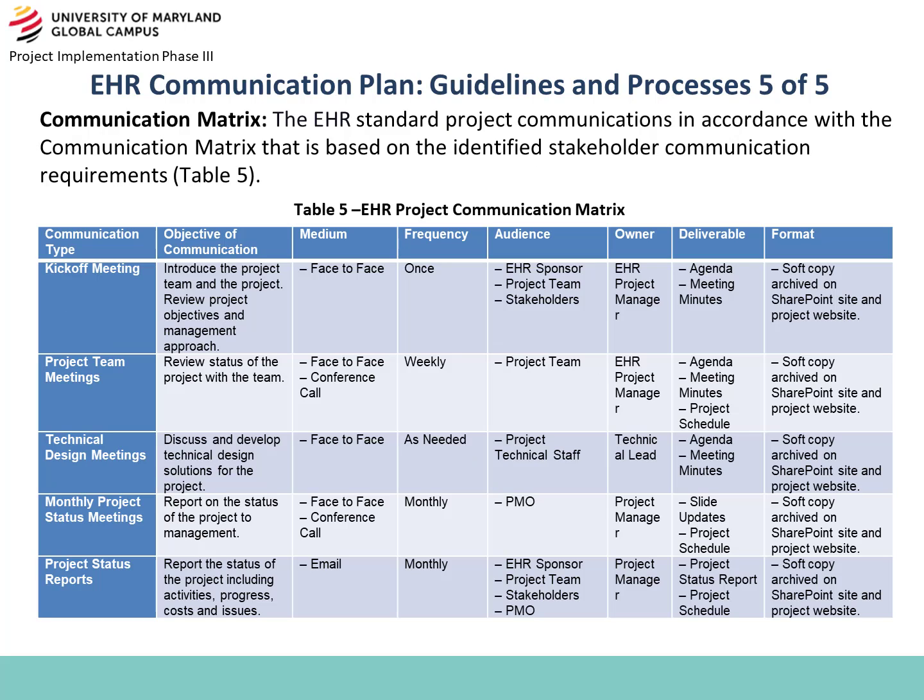The prior guidelines and processes laid the framework to come to this one, which is the communication matrix. Essentially, it lays out the entire plan of what type of meeting we're going to have, what the objectives are, what the medium is going to be, the frequency, who the audience is, who the owner is, the deliverables, and the type of formats. And with this in hand, you'll be able to put together a very comprehensive communication plan that addresses 99.9% of the needs of the EHR implementation.